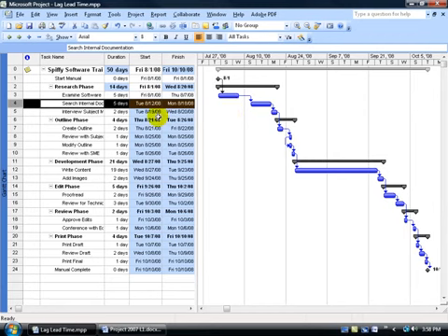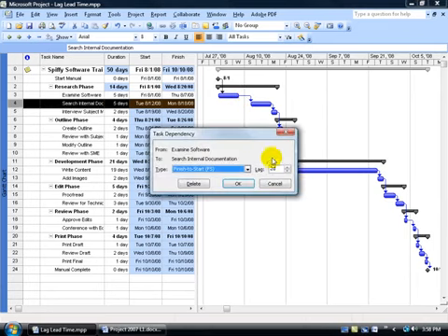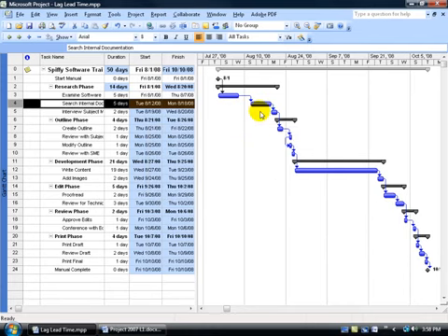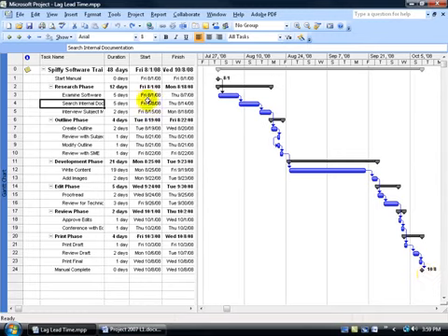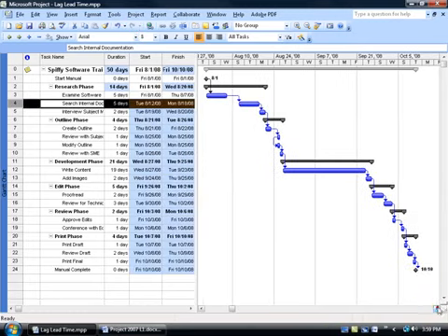First of all, in the entry table, the change I made shows everything that's highlighted has been affected by that change or that lag time. Then over in the Gantt chart, it doesn't extend the task, it just extends some time or delay or lag time. If you hover over it, it shows you a little pop-up that says lag time. In fact, you can double click on it here and add your lag time as well. And it pushes everything else out because of the delay, so no longer does the project finish on October the 8th. In fact, if you hit undo, there's October the 8th, and I click redo, it's now October the 10th.